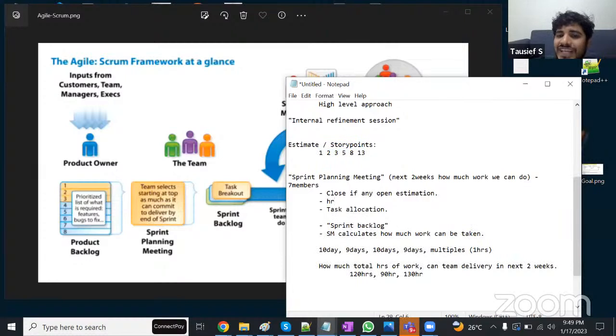Okay, nothing but the amount of time that it will take to finish. Again, we will get into more details, but here it comes: UI time, server time. Some companies might not do this. They might simply say, based upon story pointing. But we realized a lot of uncertainties were coming because of that. So what we applied is the old non-agile way of time calculations, and we mixed it along with the agile calculations of story pointing. So we are doing it that detailed.